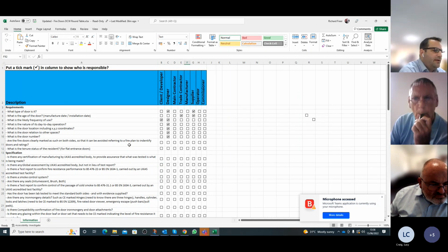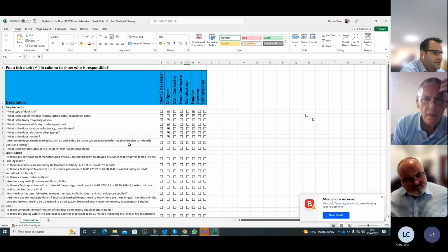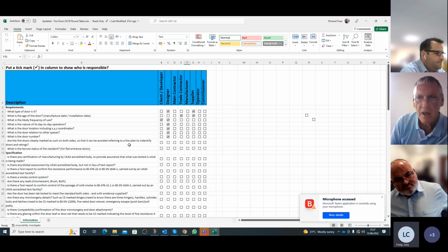I would say probably your main contractor, but that along with whoever has installed it. Again, it goes back, Richard, to the golden thread that we were talking about before. So it's data capture. Well, I think you're right. It's both, isn't it? So the trade contractor needs to do the fix, but then the main contractor should have some hold points in place to check that that's been done from a sign-off point of view.